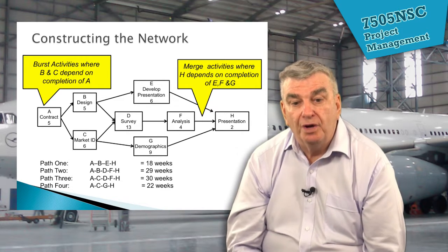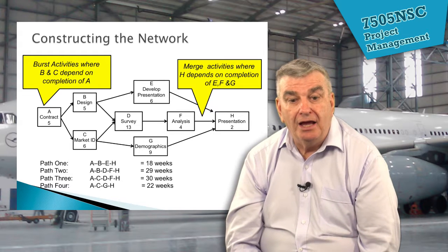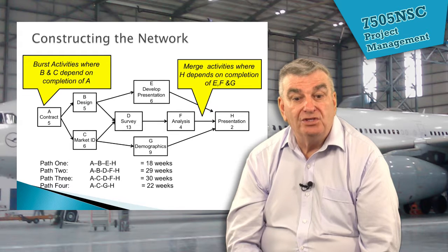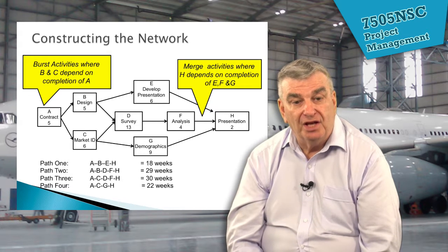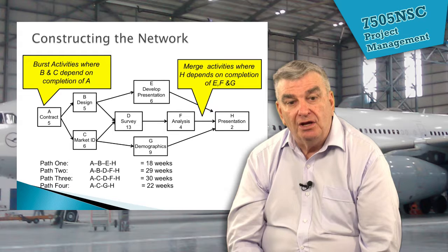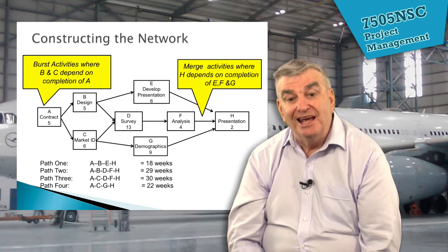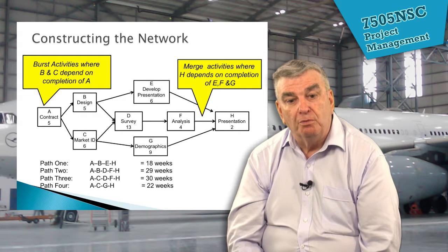And we said the critical path is the longest path. So A, C, D, F, H of 30 weeks is our critical path. That is, if the time increases for any one of those activities, it will extend the time of the project.